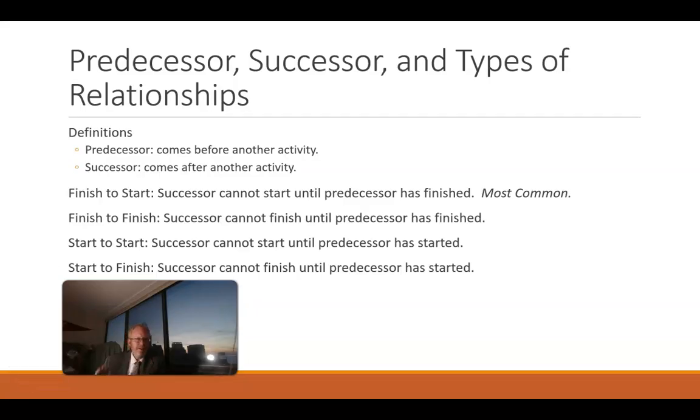But we need both of you to start at the same time so that you can agree on this contract first. So that would be a start to start. And there's still a predecessor-successor relationship there because the UI could not be complete until the API itself is complete. So those two do have to go in sequence even though they start relatively at the same time.